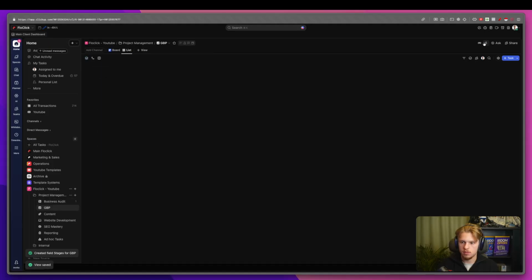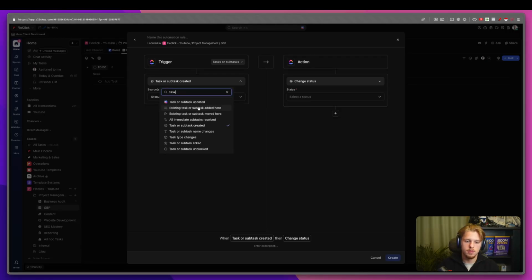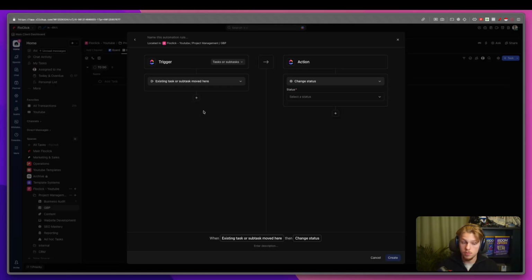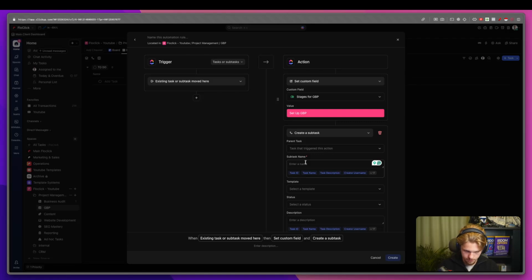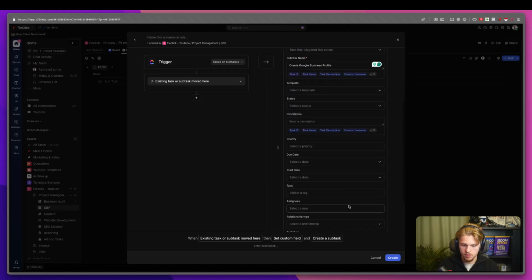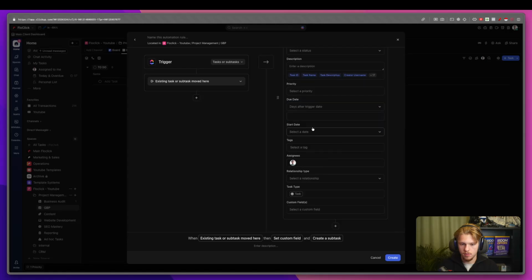Once a thing has been created, so once the existing task is moved here, we set the custom field to GP and create subtask: create Google Business Profile, assign myself, due date, 2 days after it has been triggered, right?